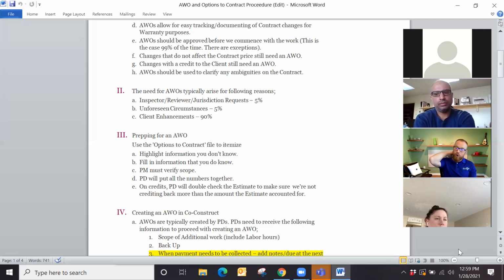And we also added, mandatorily, to the executive summary, to prepare them, to say, this is a big deal. We're experiencing spikes of material costs. So that client had been prepared at the contract signing. They specifically signed off on that line item on the contract. So we've set the table accordingly.